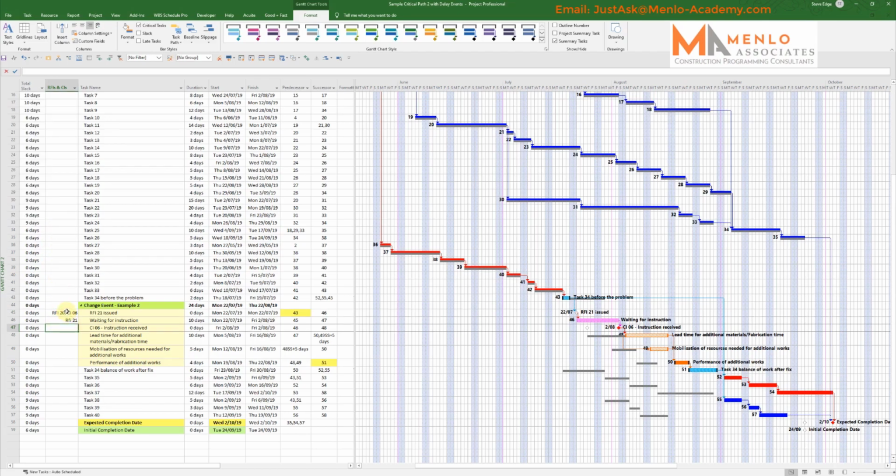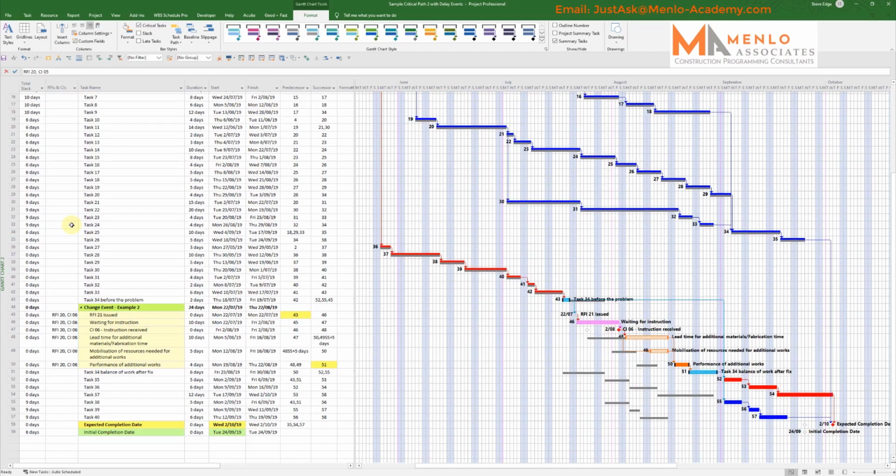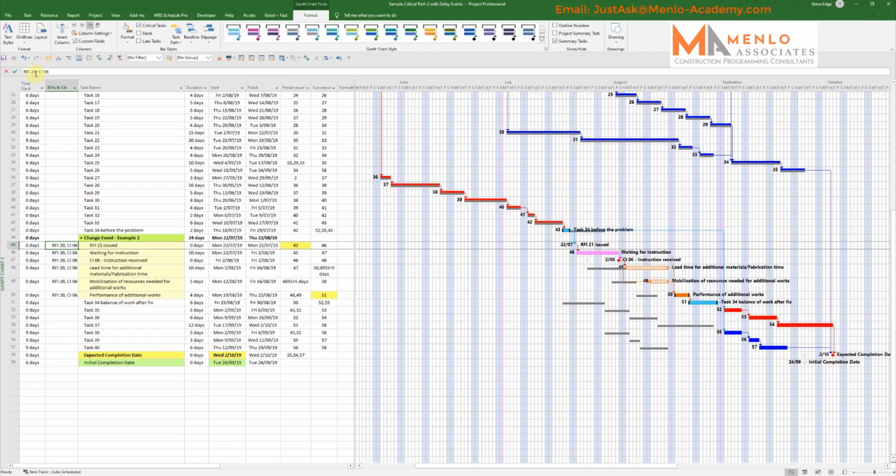So it allows me to, at the end of the month, when we're doing reports for project control group meetings and reporting on progress, show very, very quickly outstanding RFIs that are still waiting on an answer, and we can prompt the client to get his act together and give us an answer. And you just notice in there I put the wrong RFI number against the other one. So I'll scroll that down, and this is in fact RFI 21, not RFI 20.